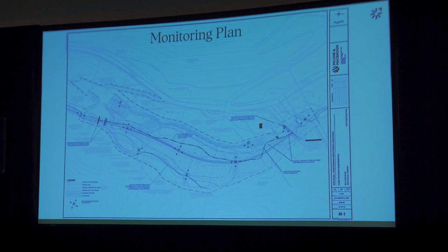Yeah, so the one thing we also wanted to emphasize before we get into construction, and this can take place much earlier or not, is that often we want to have a monitoring plan in place. Sometimes it's required by the permits, but even if not, we like to have monitoring stations set up before construction. Sometimes this gets pushed off and forgotten, and construction is starting and you have to rush out there and establish them. We like to have a few; you can see the letters there of our photo monitoring locations.